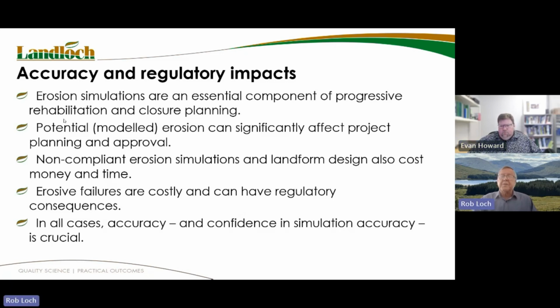There's also the point that mining is a fairly regulated environment, and for example, erosion simulations are now an essential component of progressive rehab and closure planning, PRCP, developments, and the potential modelled erosion rates can affect project planning and approval. Delays to projects can be very, very costly. And non-compliant erosion simulations, apart from the need to get them in the first place, if they were found to be non-compliant, also cost money and time.